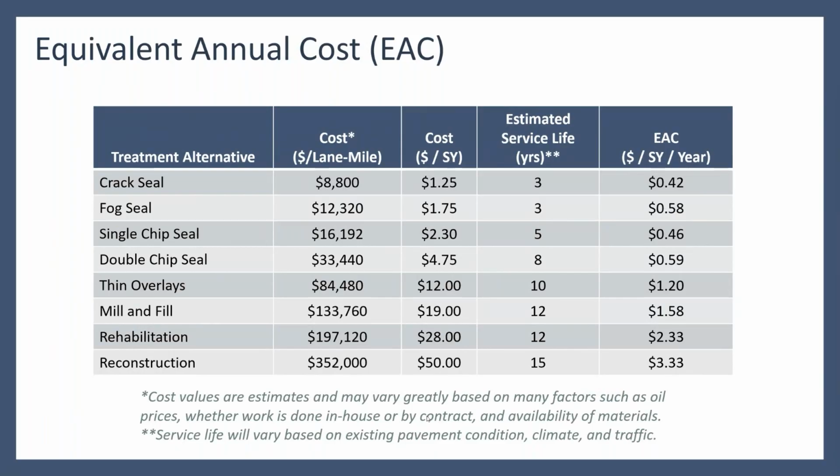I know a lot of you that are tuned in on the webinar are from other states, so could be wildly different from these numbers. It also makes a big difference if you're doing asphalt work. Oil prices impact things quite a bit. If you do the work in-house, if you've got a large crew, lots of equipment, and you can do things in-house, that may make your prices lower. If you have to contract everything out, you're hiring a contractor to bring in lots of equipment, you're going to have mobilization charges, all that kind of thing. It's going to be much more expensive to have someone else come in and do that.